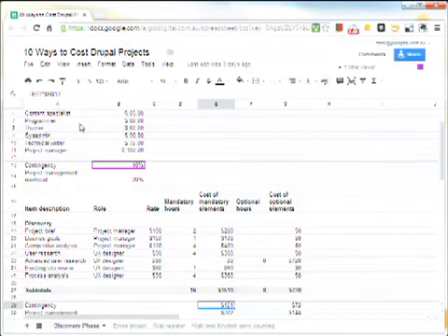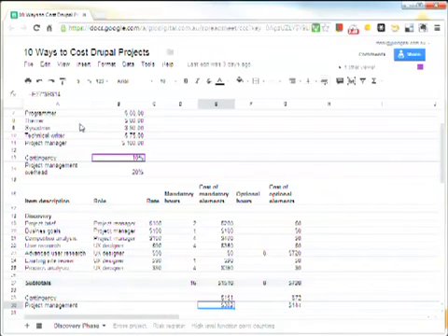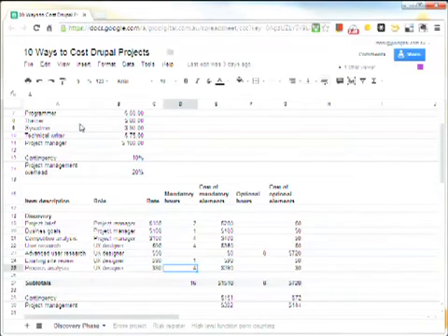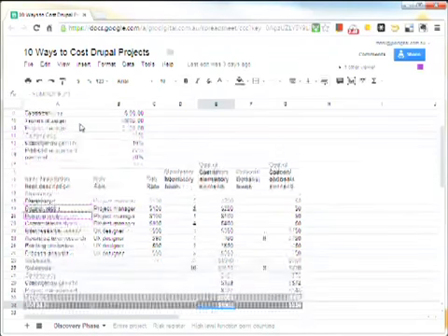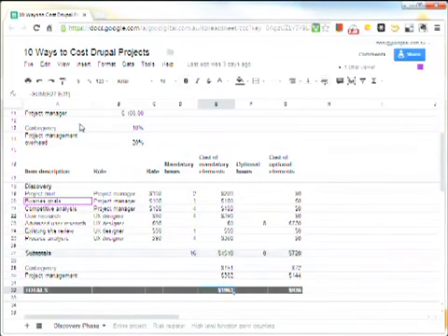And add a project management fee. I'd always recommend to add those two items, both a contingency figure and a project management fee. Because the idea behind these here is you're putting in the hours that the actual work is going to take. So if there was a development phase here, and we'll get to that, the hours that the developer has estimated, probably multiplied by 1.5 or 2 if it's like other developers I know. Okay, so we have those, and out pops at the bottom a total.